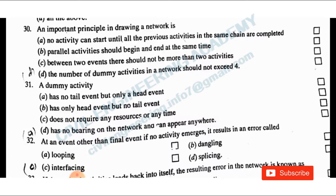Question 31: A dummy activity has no tail event but only a head event; or only a head event but no tail event; does not consume any resources or time; has no bearing on the network and can appear anywhere. A dummy activity does not require any resource or time — that is the answer.